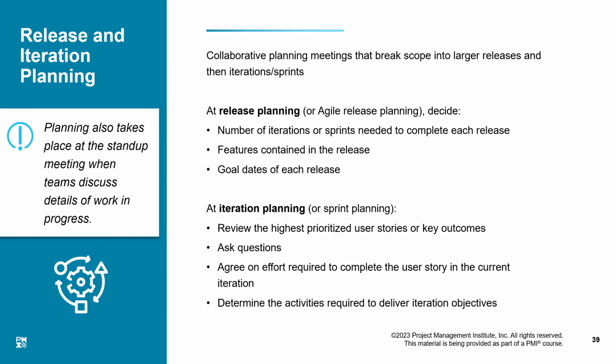Just remember, when we are working on something, whatever activity we are doing, when we are working on that iteration, whatever work we have taken on or committed, only those work items cannot be changed during the life of the iteration. Once the iteration is complete, the customer has approved or even rejected, that is the point the things which are incomplete will go back to the product backlog, right?